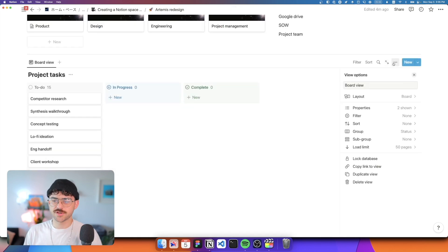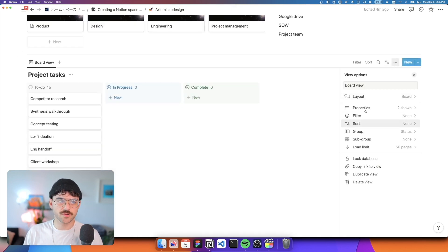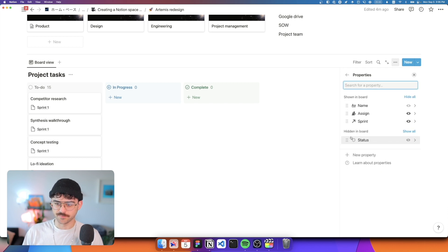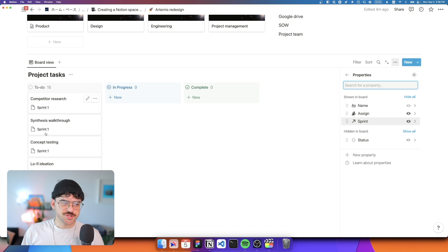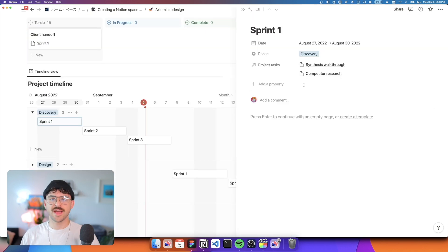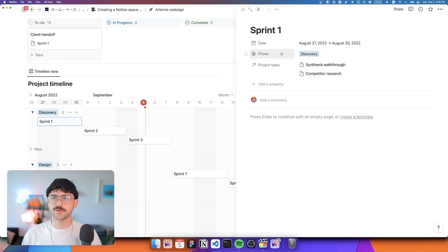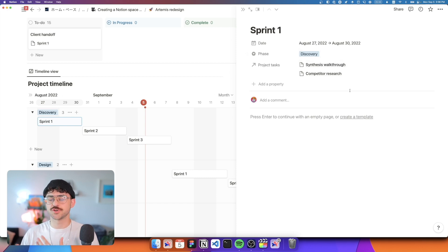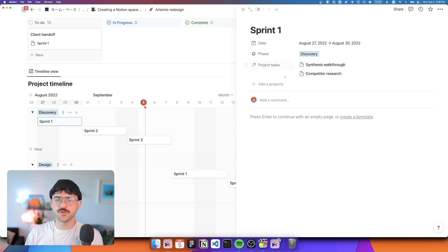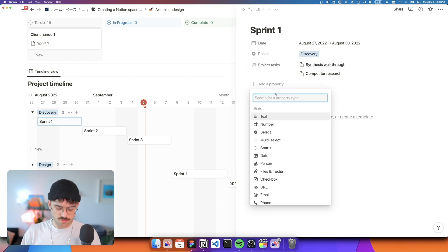So now that we have all of our tasks tied to a phase, we can go back here to our project tasks. And if we want, we can actually show that sprint. And now we see that each task is tied to a specific sprint. So now that we have all of our sprints tied to each of our tasks, we want to show a progress bar to show the actual progress of each of the sprints.